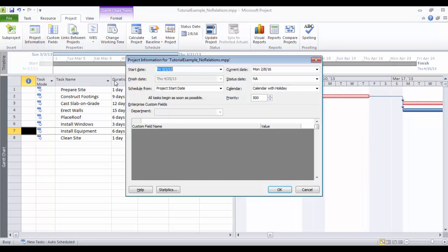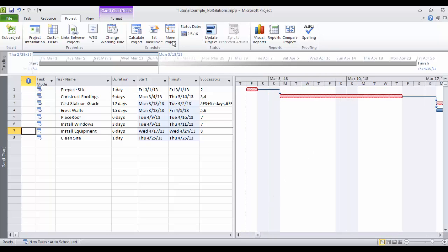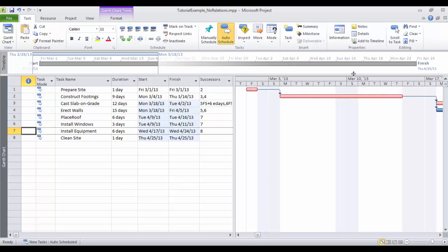And if you go back to the project information, now I extended the project by one day from April 24th to April 25th because of this holiday. So we're almost done with finishing the basic scheduling part, which is part one of this series. The last thing I want to show you is sorting and grouping activities, meaning make it simple to track activities and know which parts of the project they refer to.